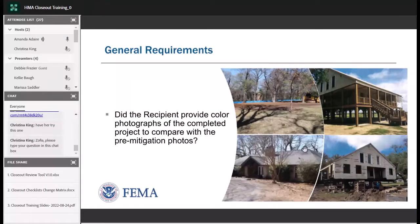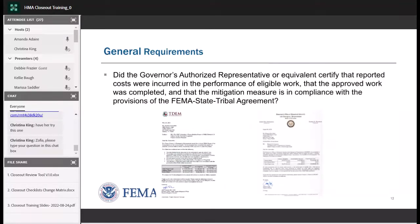With the closeout package we also require a governor's authorized representative — or equivalent — certification letter, also called the GAR letter. The GAR letter must include a statement that reported costs were incurred within the performance of eligible work, that the approved work was completed, and that the mitigation measure is in compliance with the provisions of the FEMA-state or FEMA-tribal agreement. Here are examples of GAR letters we typically see from Region 6 states.